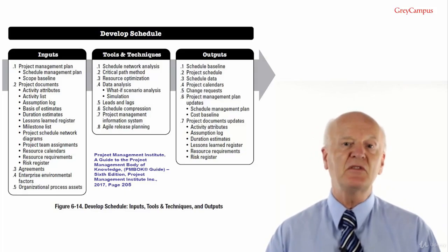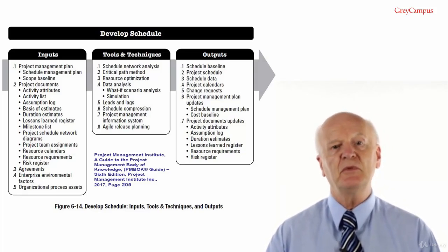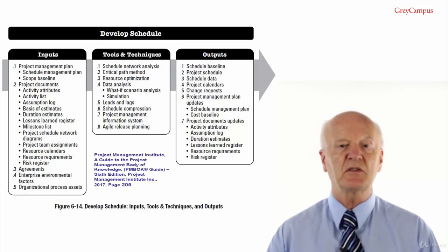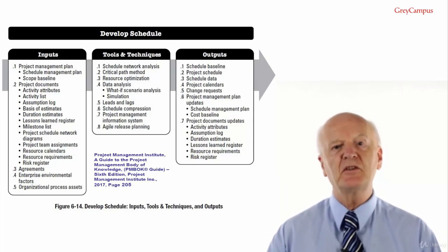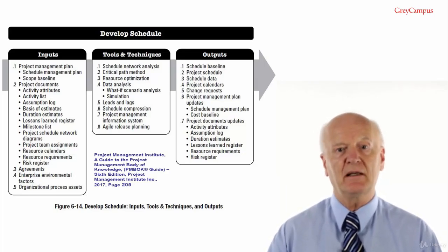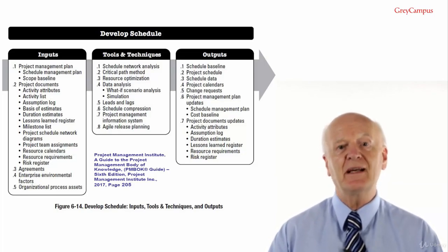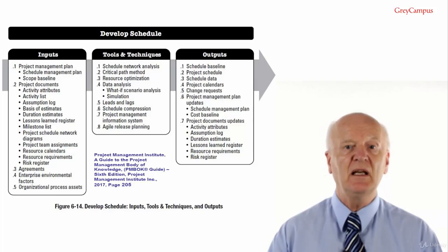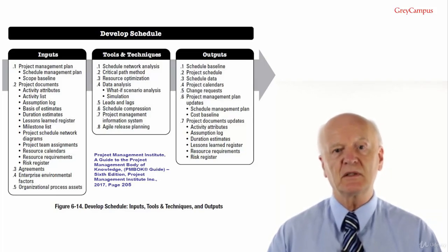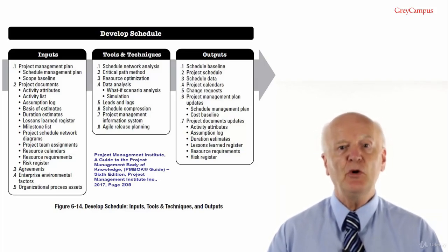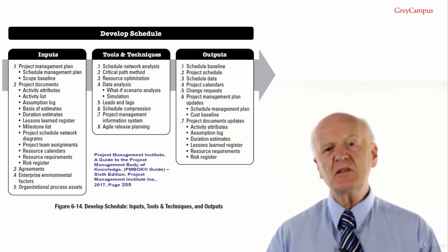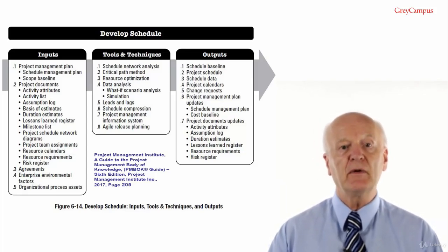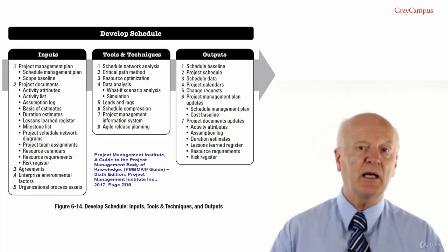With added activities to the schedule, it is common to assume that there are no resource limitations. Once all the activities have been added, you need to do 2 sets of calculations. The critical path method is used to estimate the minimum project duration and determine the amount of schedule flexibility on the logical network paths within the schedule model. This is achieved by, first of all, doing a forward pass, then a backward pass.